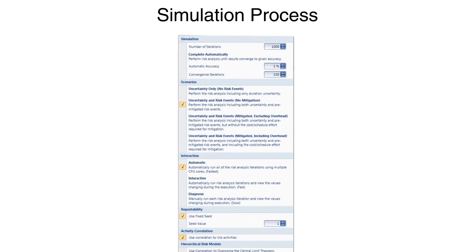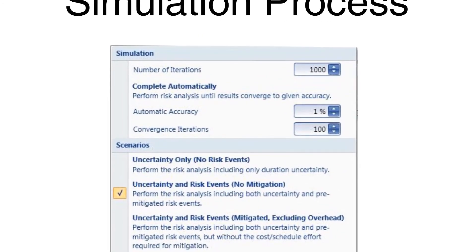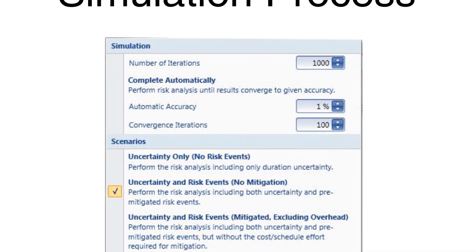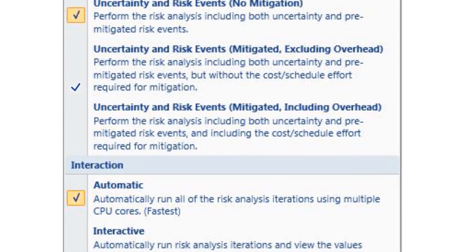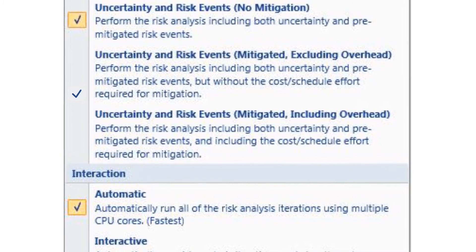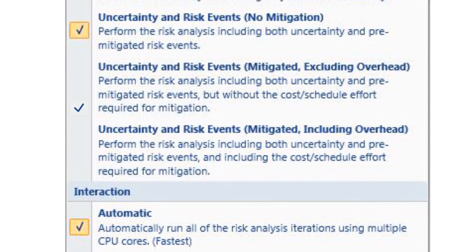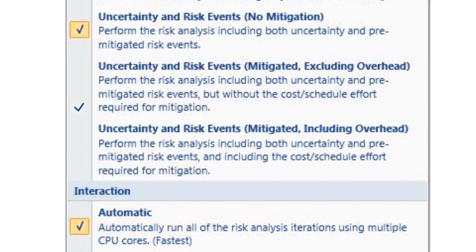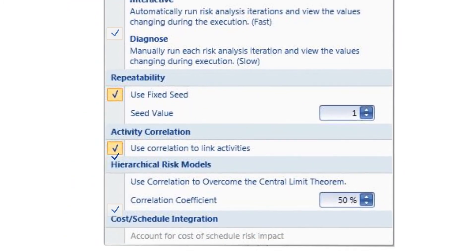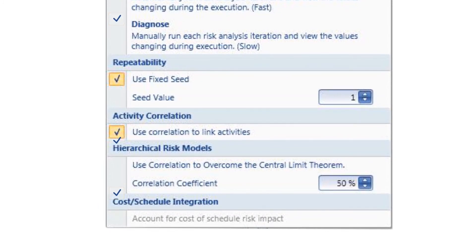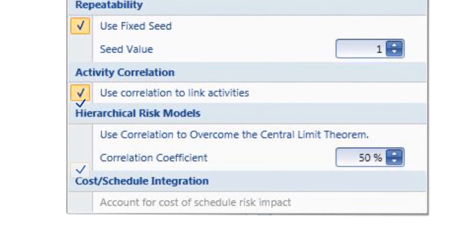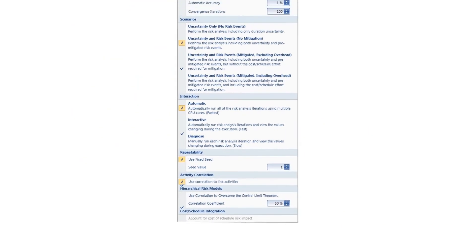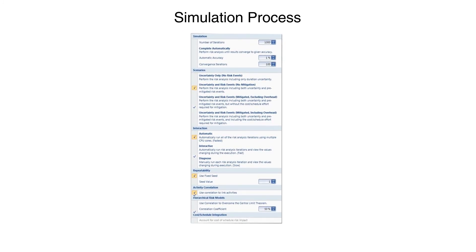A typical SRA uses Monte Carlo techniques to simulate hundreds or thousands of potential project outcomes, using the risks and uncertainties that have been supplied. For most users, simply accepting the default settings and pushing the Run Risk Analysis button would be sufficient. But if terms like Convergence, Correlation Coefficient, Central Limits Theorem, and Seed Value are part of your normal working environment, Acumen provides a variety of settings that can be customized to tune the SRA to best model your project.